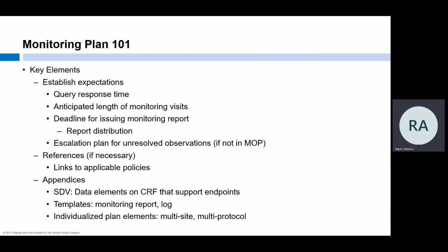Lastly, for those studies with additional complexities like multi-site or multi-protocol IND/IDEs, if there are elements of the plan that must differ for monitoring other sites or other protocols, the written plan for executing those activities should be written and included as an appendix. Make sure that the body of the plan itself directs readers to these sections.